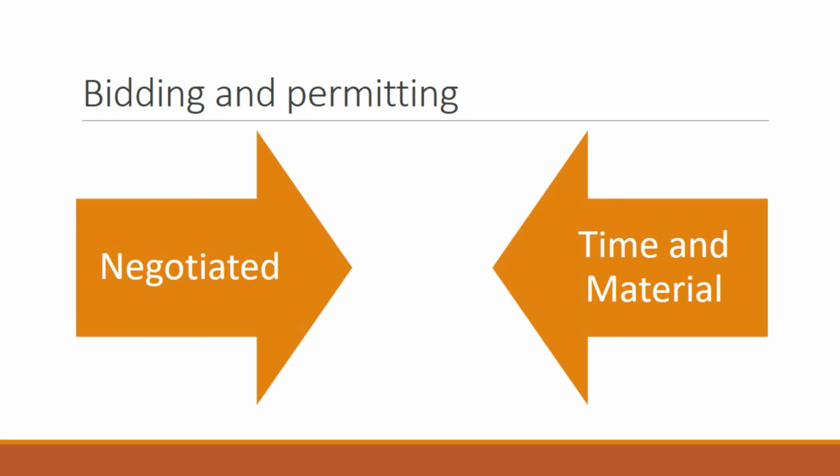Now, it is actually a good thing to consider pre-qualifying bidders prior to bidding in order to reduce the likelihood of the lowest bid syndrome, which leads to unqualified successful bidders. And if time permits, it is recommended that this is the greatest strategy for subcontracting because it makes use of market forces and should eventually keep the lowest cost while maintaining quality.